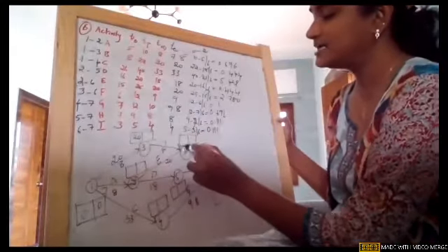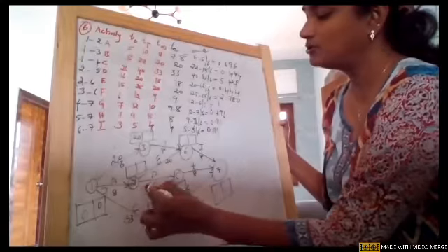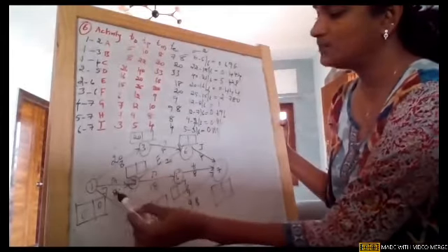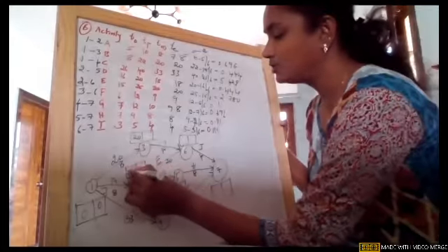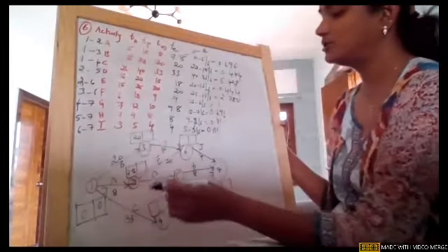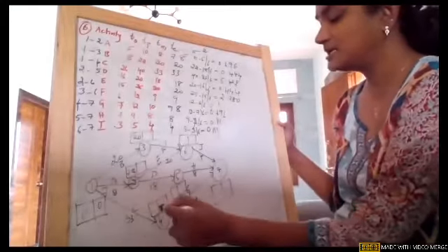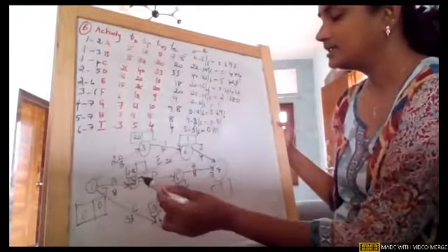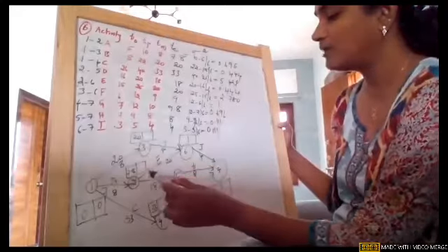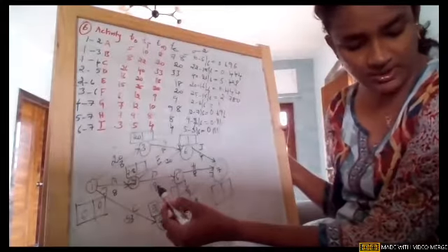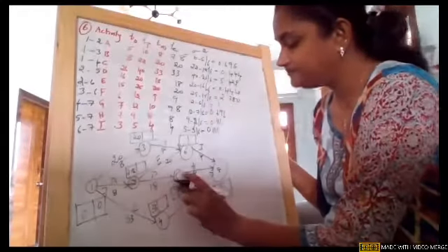Node 6 has 2 arrowheads, so go back to node 2. Node 2 has a single arrowhead, so 0 plus 7.8; the earliest time on node 2 is 7.8. On node 4, single arrowhead, 0 plus 33, 33. Then node 5, single arrowhead, 7.8 plus 18, which I think is 25.8.